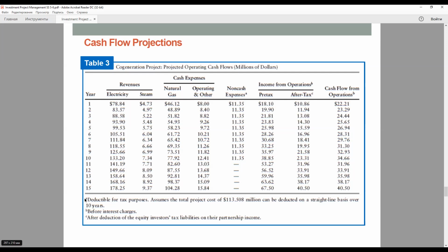And if you use a higher level of inflation, given all the other drivers constant, you will receive higher financial results for each period, and subsequently higher financial cash flows, while you leave, for example, the weighted average cost of capital or required rate of return the same. That will lead you to a higher NPV.